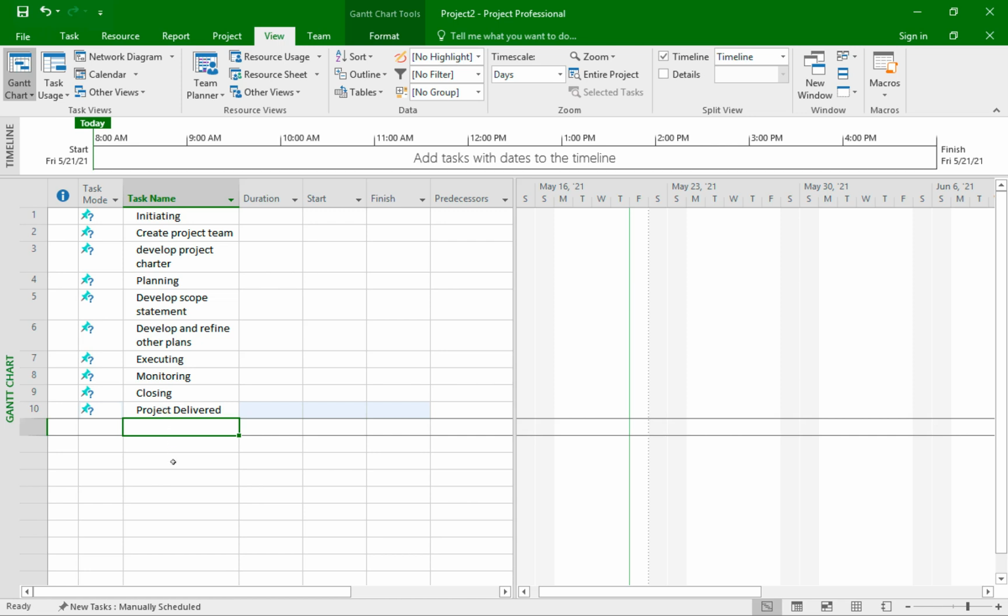Now this is just a sample of the tasks needed for this project, and your list of tasks will be more than just these few lines, but I'm only doing this short list for demo purposes. Alright, now once you have entered all your tasks, you need to organize them. The best way to think of this is like an outline of a paper, where you have chapters, sections, and subsections. So the first thing to do is wrap up all these tasks into one project.